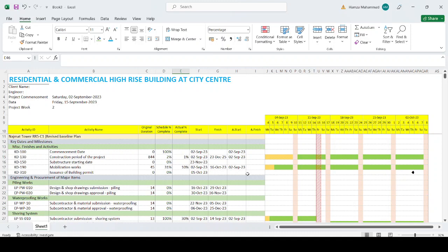But for a small duration, for example, 2 weeks or 2 to 3 months look ahead, it is a very excellent tool to make a dynamic Excel chart using our start date and project week, and our actual progress and schedule percentage will be calculated automatically, and we just need to update as normal in Primavera. So I hope it is helpful.